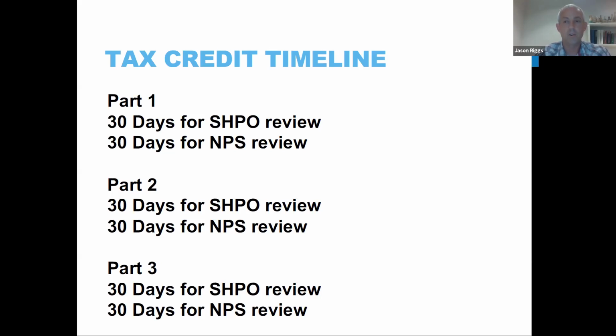the response. The part two application, it's the same thing. Now, one thing I can say is, obviously you don't want to have two 60 to 75-day review periods. Typically what we'll do is that we will submit the part one and the part two together, and that way that timeline is running concurrently, and within 75 days or so from when it's submitted, you will have both part one and part two responses.